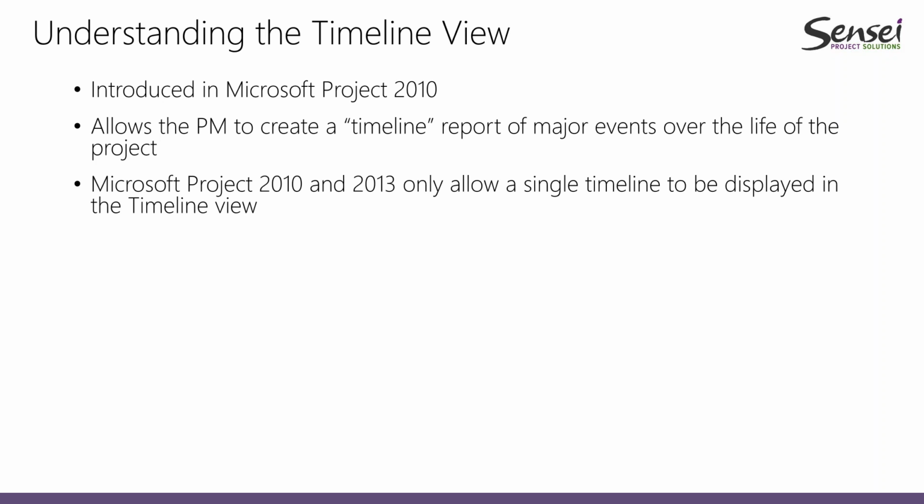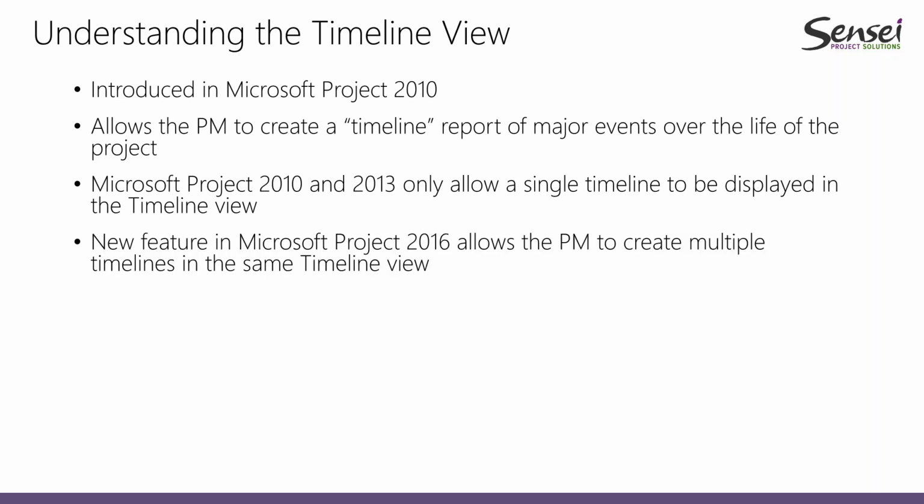From Project 2010 to Project 2013, those two versions only allow a single timeline to be displayed in the timeline view. So even though it's a great feature, it only allows us to use one timeline. But starting in Project 2016, project managers can create multiple timelines in the same timeline view, and I'm going to show you how to do that.